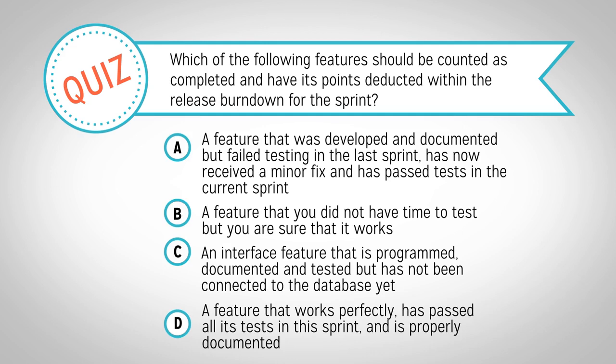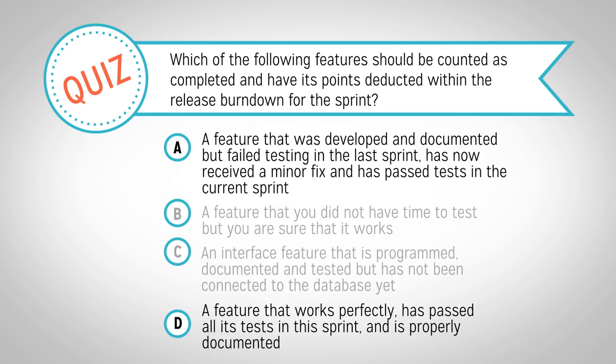Only features that have met the team's definition of done can be marked as complete for the release burndown. Answers B and C have not met the definition of done and must not be marked as complete. Answer A demonstrates a feature that didn't meet the definition of done last sprint but now does, so it can be marked complete this sprint. Answer D also meets the team's definition of done. A and D are the correct answers.